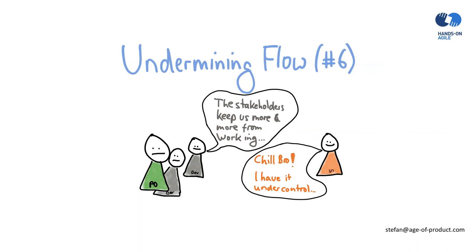Preserving the flow of work through the team during the sprint is the linchpin of productivity. That's why work in progress limits are so useful, avoiding creating artificial queues. And there's another reason why you need to be cautious about this. If the Scrum team fails, no stakeholder will read the fine print afterwards about what happened during the sprint. All they see is the Scrum team did not deliver. And this will inevitably undermine the trust in the team.